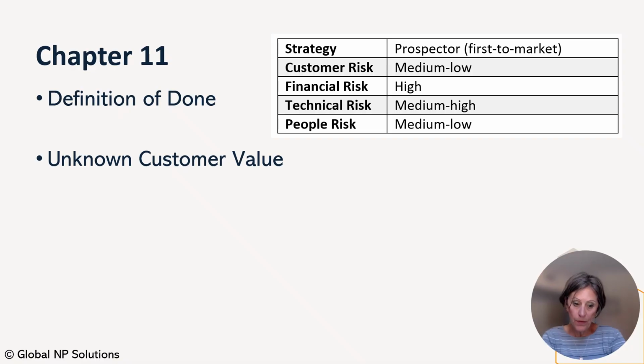Not knowing product value. If the product owner solely represents an internal business perspective, it is extremely difficult to determine the delivered value of a product or feature. In this case, the role of the business analyst is a significant help to rank and select projects across a portfolio with consistency. The product backlog should be prioritized based on value to the customer, end user, and value to the business. Delivered value is then validated during retrospectives and product releases.